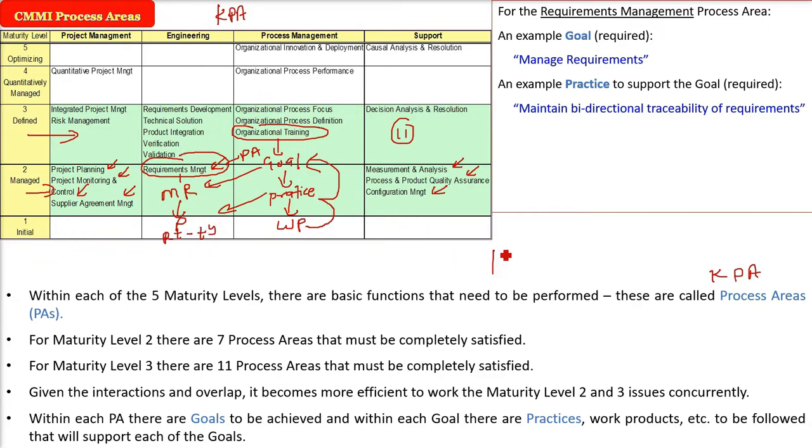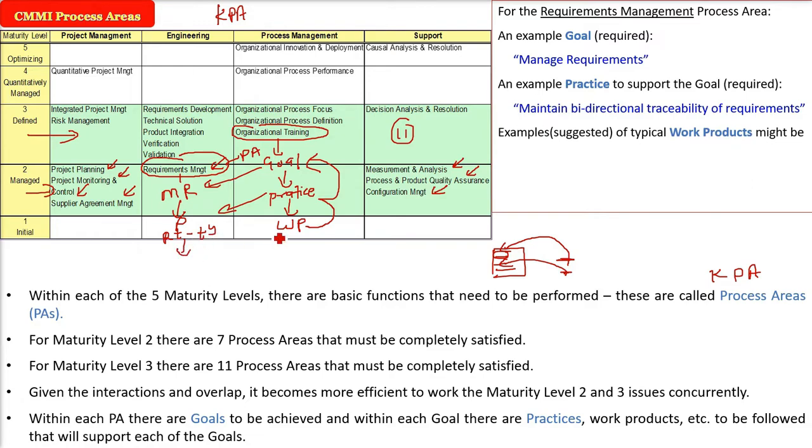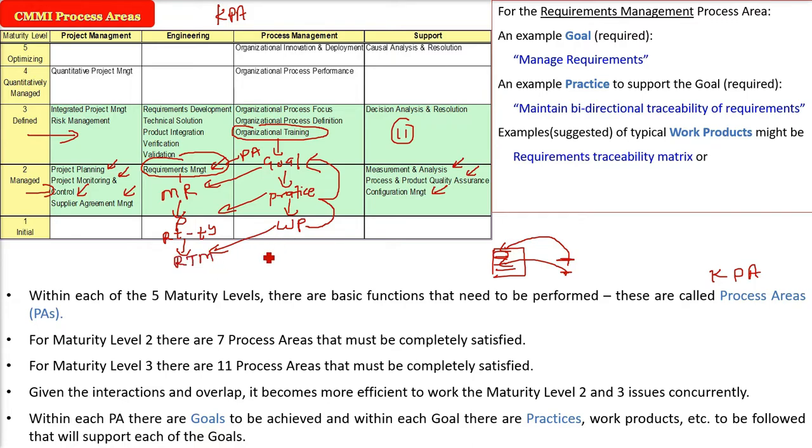If you have done things, there are requirements, you should be able to trace everything back to these requirements. Traceability should be there. So, what will be the work products? By this practice, the output result will be the requirements traceability matrix or the requirements tracking systems.